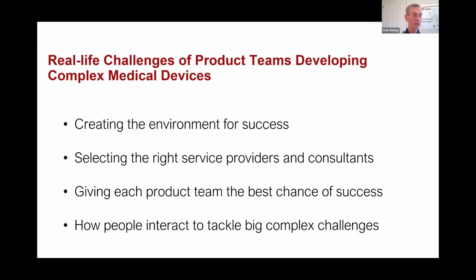To do that, you need very good requirements at the beginning. If you don't have requirements, which is fine, you need to work on those before you try to design the device. Don't do it without clear, complete requirements. You need a schedule and a budget that everybody agrees to. You don't want to begin developing a project where manufacturing, marketing, and technical support don't even know about it. They better be involved.